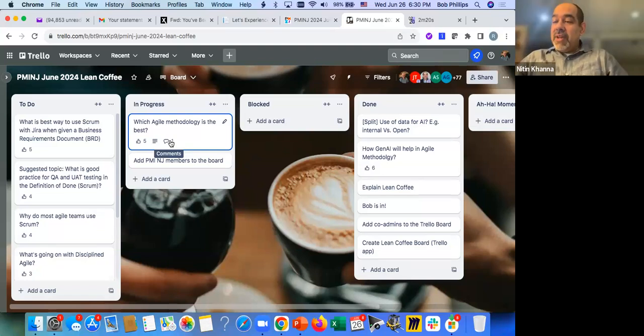Yeah, just to supplement what you've said, Kanban has 4 practices. One is the visualization of the workflow. That's the key thing. Limitations of your work in progress, or WIP, and then active management of the WIP, and inspection and adaptation of the team's definition of the workflow. Scrum team members can also utilize Kanban. Kanban is certainly a flow-based model. It's very useful if you're going from point A to point X, Y, Z, whereas Scrum, I feel, has a little bit more creative freedom and a lot more of the unknowns.